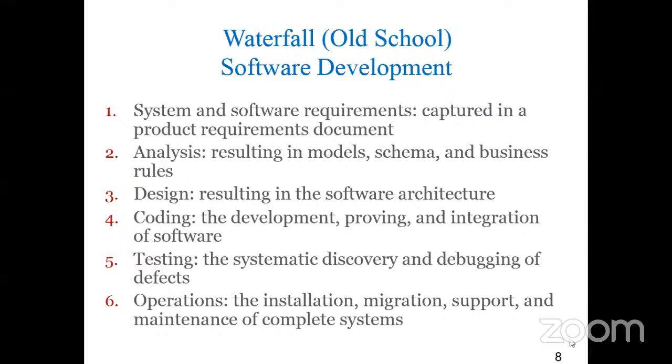So from that context, if you are delivering in the waterfall model after 2 years, and the end product is only shown at the end of 2 years, and before that the customer could not see anything of what you are developing, how does the customer understand that you are working well? How much tracking can he do? The product is going to be delivered only at the end of the 2 years, and even then it is not guaranteed. If you find a muddy area or a thorny area or a pond and say that you cannot deliver this project, by that time the customer would have spent $10 million, right? Are you going to give those $10 million back to the customer? No, right?